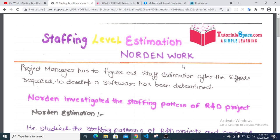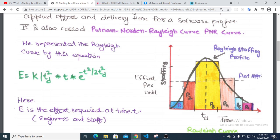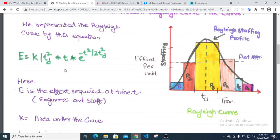Staff level estimation: we investigate the staffing pattern of Rayleigh and developer project. The equation is: L(t) = k divided by Td squared, multiplied by t, multiplied by e to the power of negative t squared divided by 2 Td squared.